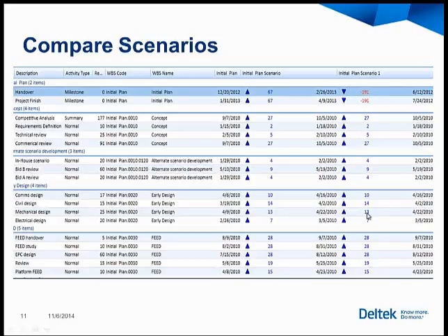The takeaway here is, in my old world, every one of these WBS areas would be subject to a 10% cut. In this case, these blue durations are increased. I don't want to get too technical here, but these blue durations are increased. These areas can actually take longer, and our scenario still gives us 191 days of acceleration.